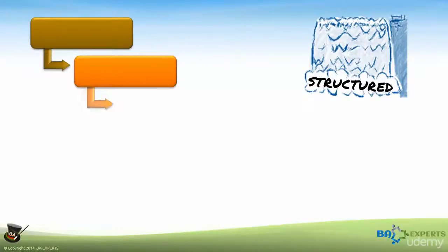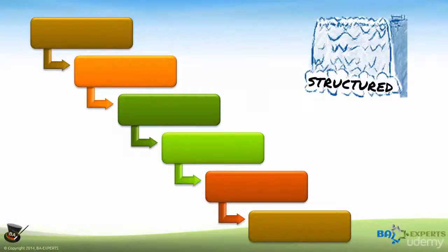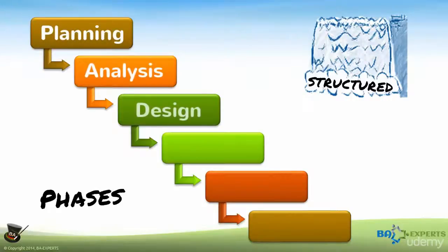Structured or waterfall approaches apply a rigorous sequence of tasks and deliverables to the process of delivering a solution. The tasks are typically subdivided into phases such as planning, analysis, design, development, testing, and deploying.